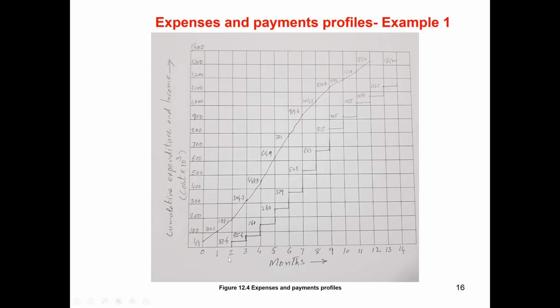So then payment, the first payment that the contractor is going to receive is 30,620. Yeah. So we are going to show here that the first month's work done will be submitted, and then the consultant will have 1 month to pay this payment. So after 2 months, the first payment they will see is 37,620. Okay, that is shown in thousands as 37.6. And the next cumulative payment was 85,585.5, so we show it as 85.6. The next payment was 160,825, so just showing 160.